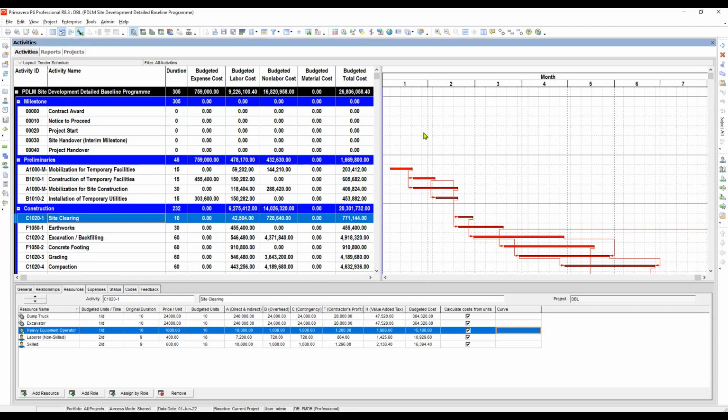Okay, let's close this one. So as I said, in the case of our project, we'll decide not to assign a resource curve. So you know what will happen if we will not assign the resource curve in our project? That means the resource units and cost will be distributed evenly in the activity unless we assign or specify other curves from the predefined curves. Okay, so let's go to the activity usage profile. What shall we do?